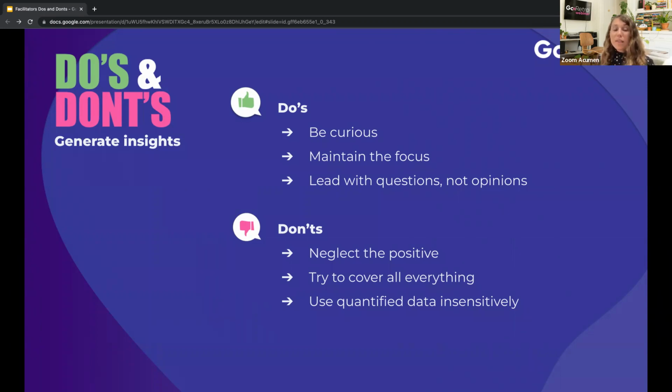But if we say that and we remind the team that we had a huge blocker bug that was really affecting all of our work, or there was a holiday, or someone was sick and that really affected the team, then that really makes things look a bit different, and it's a lot easier to take that feedback. Okay.